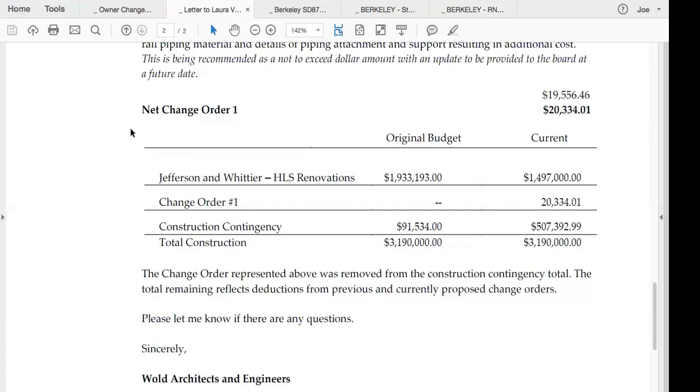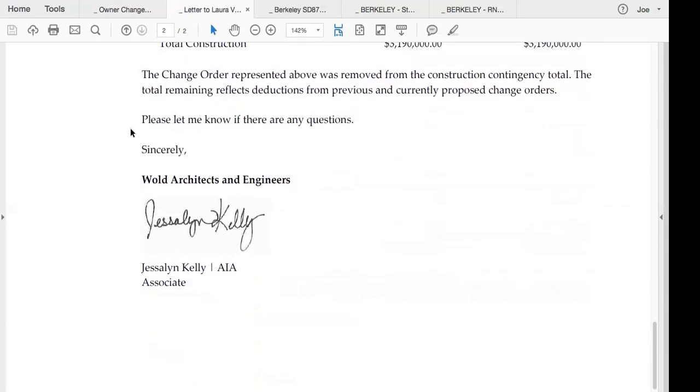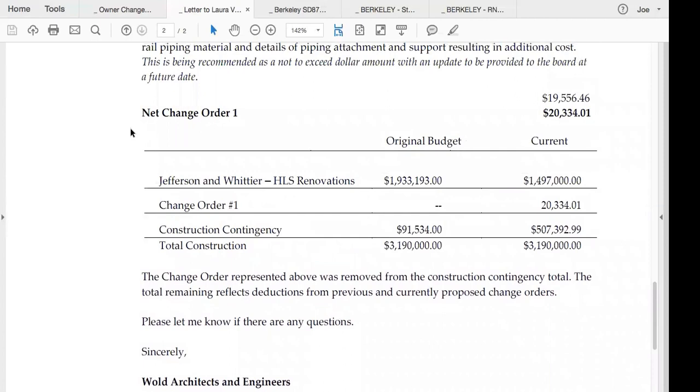So, another item that we're looking for board approval. We put a package together to provide signage. This is room signage for not just Sunnyside and Carver, but also Riley and North Lakes. We bundled that all into one package to add a little more cost effectiveness, and this will all happen over the summer. This building will happen as soon as the products are available.